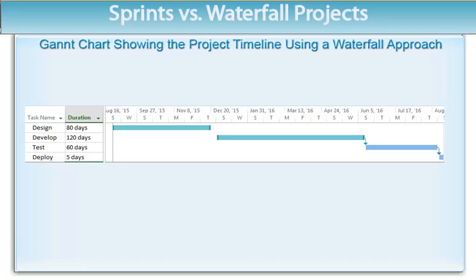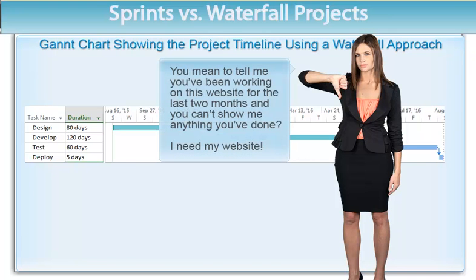If the web design project described in our case study was designed and developed using a traditional waterfall approach, it would likely take months before all of the design documents were completed by the business analyst. Only when those documents are complete, describing every possible feature of the website, would the team actually developing the website even get to begin their work. Then, the team developing the website would finish all their work before it's handed off to testing. Testing would then try to ensure there are as few issues as possible before deploying the new website. From start to finish on a large website, it would take many months, or more likely over a year.